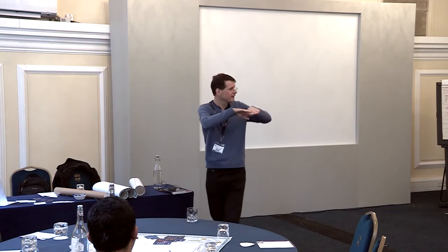So once you get above 8 people, I typically say break into 2 smaller groups, or even 3 smaller groups, whatever. If you've got 20 people, then you have 3 separate groups. Have the groups do the sheets independently, and then compare the results at the end.